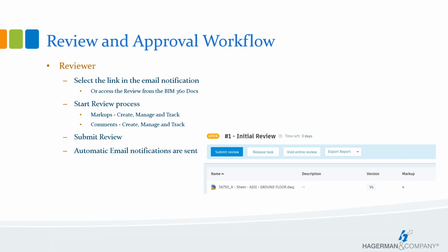An email will be sent to the individuals assigned for the next step in the review approval workflow. The next individual in the defined workflow will be able to then continue to review or approve the next step depending on the workflow template.